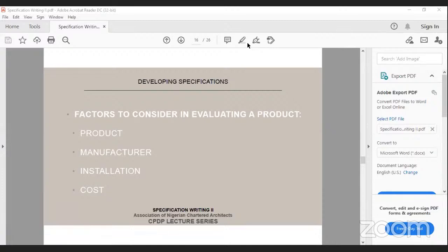So you want to know how it is going to be installed. It doesn't mean you are the one doing the installation, but you need to understand basically the schematics of installation to know whether it's worth the budget. You know the budget that your client has. Sometimes the product is cheap, and then you finish the money on the installation, and they keep coming back over and over trying to get it right. That product has already failed. You have failed to specify a workable product.